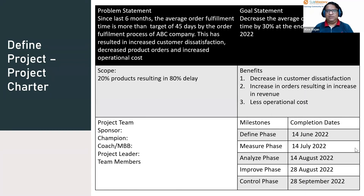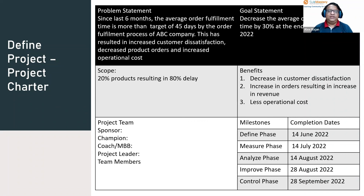This is the minimum requirement for a project charter and how to write it systematically. As a Green Belt, we will go into more detail about how to write a problem statement, goal statement, and define the scope, as well as the roles and responsibilities of project team members. The project charter includes: problem statement, goal statement, scope, benefit, milestones, and the names of the project team.